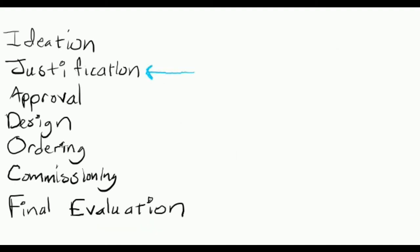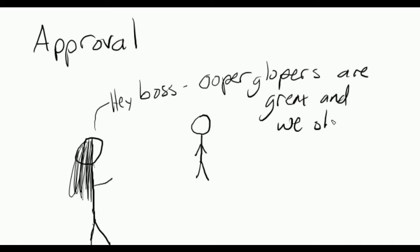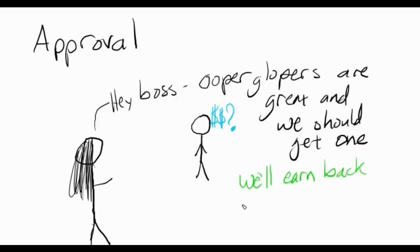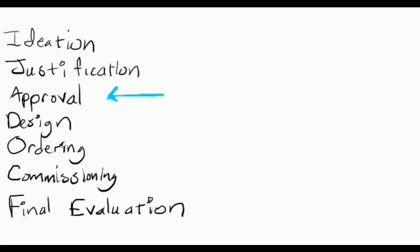Phase three, approval. When the justification has been calculated, I'll work on getting the approvals necessary to make the purchase. For many projects, this means submitting a CAPEX, short for Capital Expenditure. Essentially, I submit a report that describes the idea, cost, and justification so that anyone can understand our goal and either approve or disapprove the project.